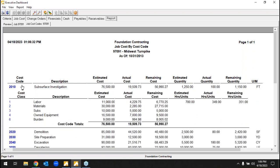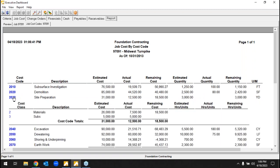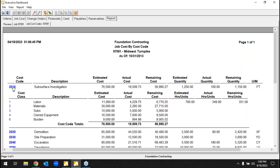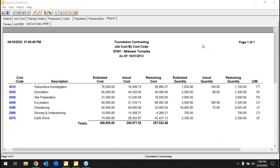As I expand down on these sample cost codes — which vary by company — some companies don't use cost codes at all and just track total labor and total material as big bucket data. Others might have things like framing, drywall, concrete, or electrical. When a job is set up, we can import that data from Excel or from estimating systems. We own McCormick, which is an electrical/mechanical estimating system, but we can also import from third-party systems.